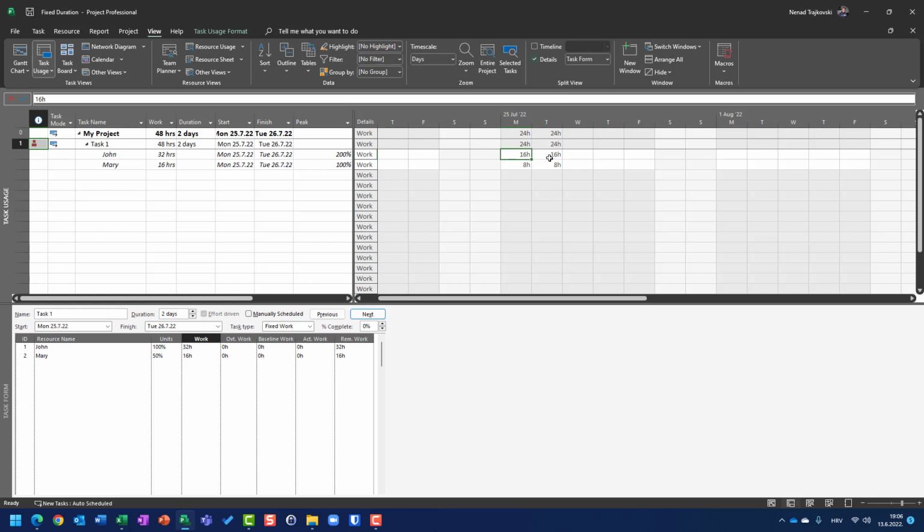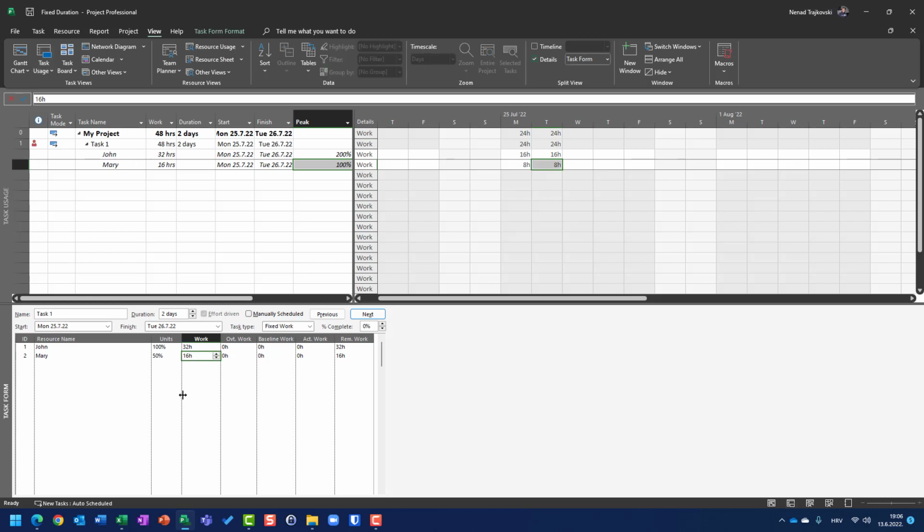16 hours first day, 16 hours second day. On the other hand, Mary should work 100%, 8 hours per day, first day and second day, because she should fulfill or finish her 16 hours in 2 days.